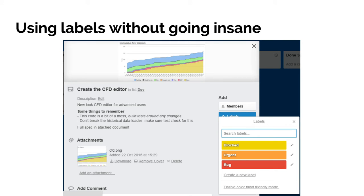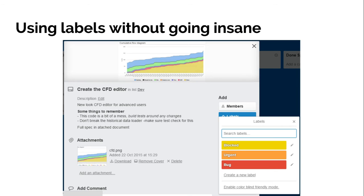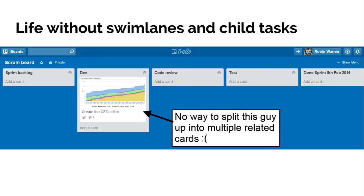The third one, which I've seen people using blocked as a list or blocked as a label. I prefer blocked as a label because it means you can mark it as blocked where it's blocked, and you don't lose that information. So if you've got 10 things in test, but 8 of them are blocked, it's nice and obvious that there's a load of work which has got to test and then suddenly got stuck. Possibly there's a problem with the test machines and that needs to go and be solved for the team. So those are two or three that I think a lot of teams would start out with and is often enough, rather than adding a lot of labels for subtask and this is a story, this is something else, all that kind of stuff, and you just end up spending too much time categorizing things.